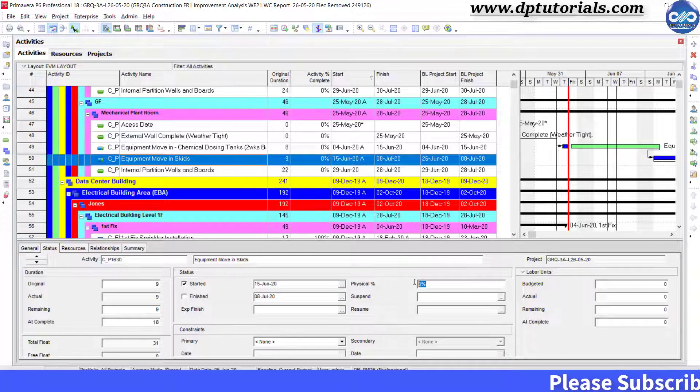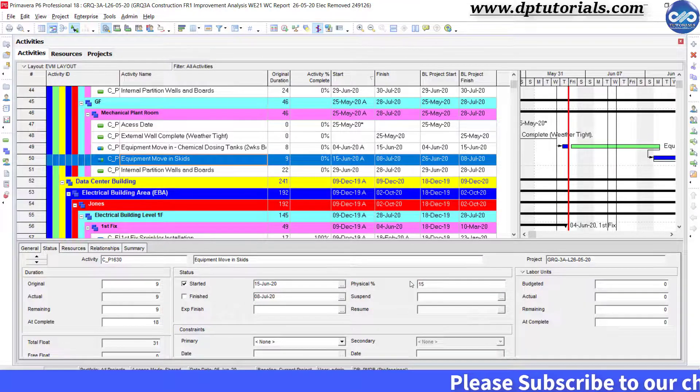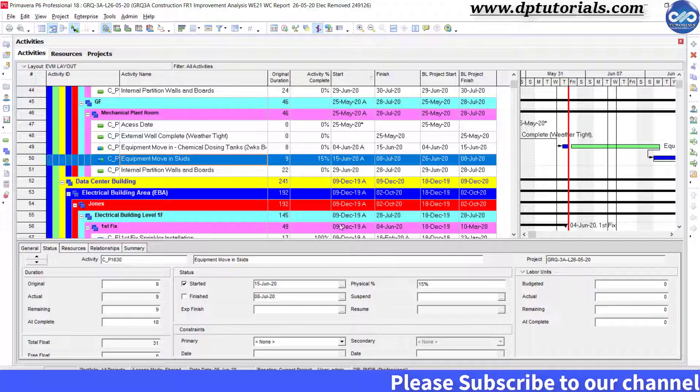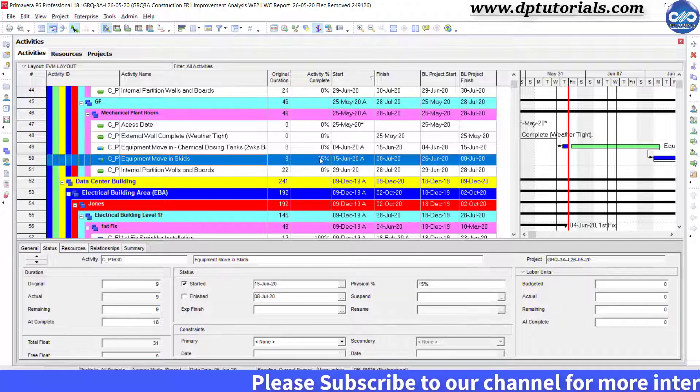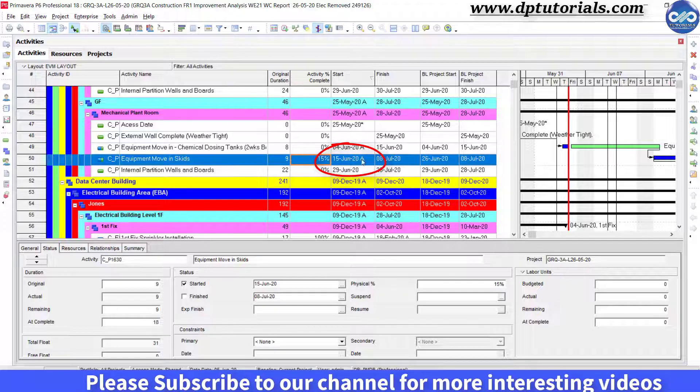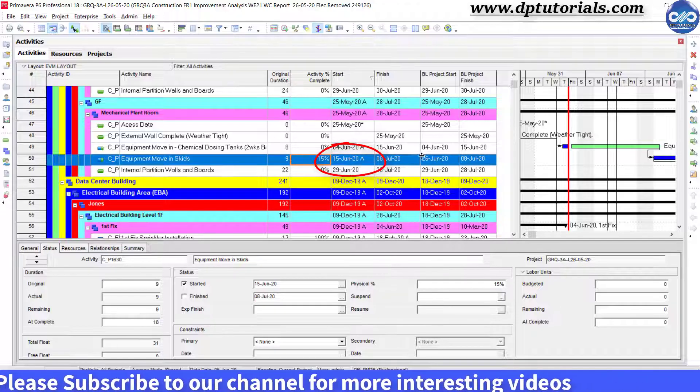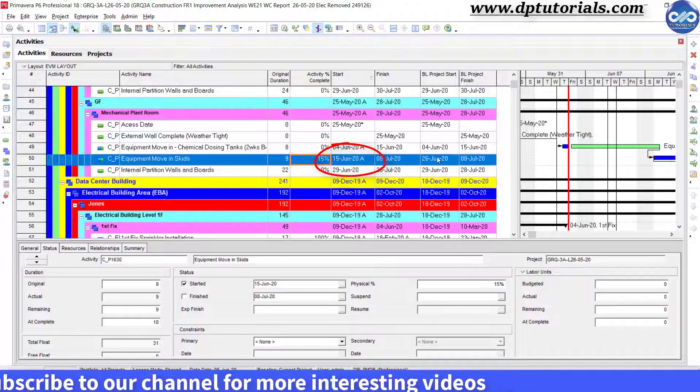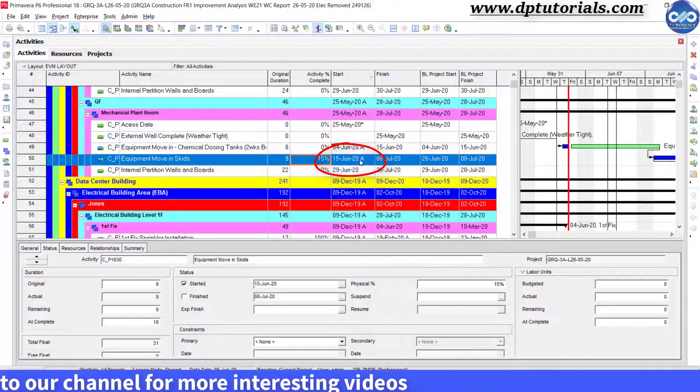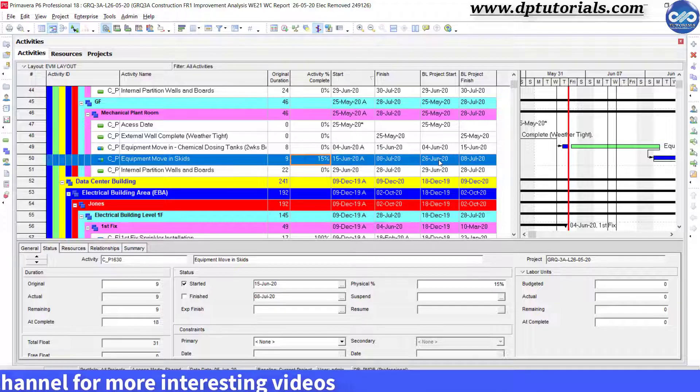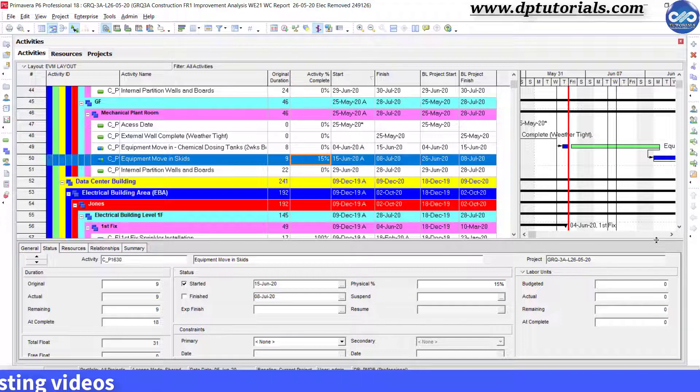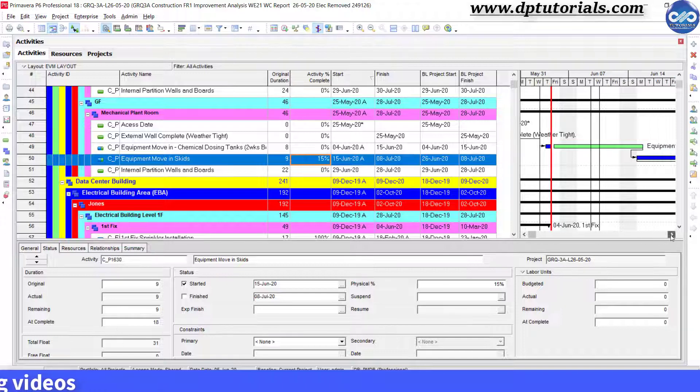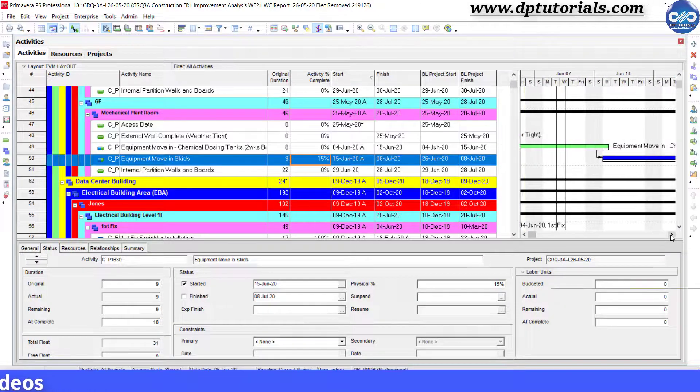If I would have run the automatic way for this activity, the start date would have been the same as baseline date, which is 26th, but it won't recognize the actual date, which is the earlier date, that is 15th June.